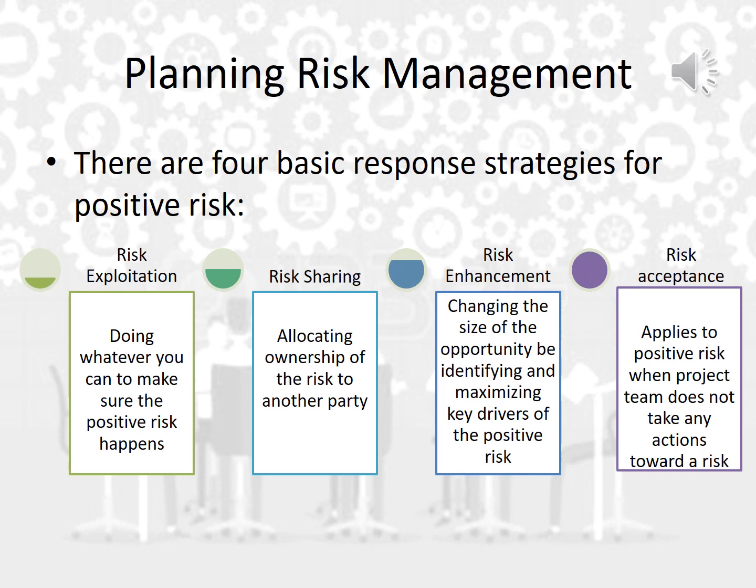Risk enhancement can happen by changing the size of the opportunity identified and maximizing key drivers of positive risks. How can it happen? We can focus on the public relations of that project, but also we can generate awareness and excitement about it among students, among parents and teachers.